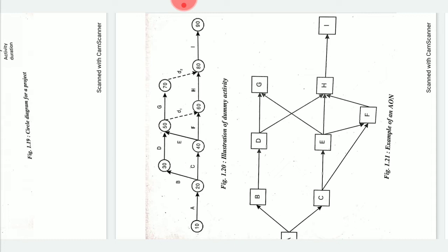People often compare AOA and AON and wonder which is the most convenient to use. The AOA is most useful when creating a simple network manually, while AON is more convenient if the network is large, complex, and with many relationships. It is also much easier for setting up computation. And AON is simple to draw and revise when compared to AOA, though computer programs can make this also a simple affair.